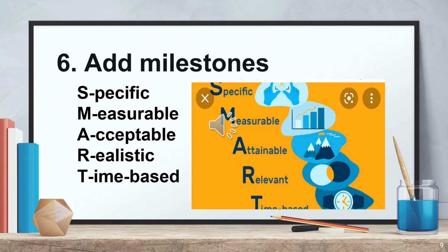And when we say time-based, we set concrete deadlines. If you have to alter deadlines associated with your milestone, document when and why you made the changes. Avoid stealth changes or editing deadlines without notifying your team and relevant stakeholders.